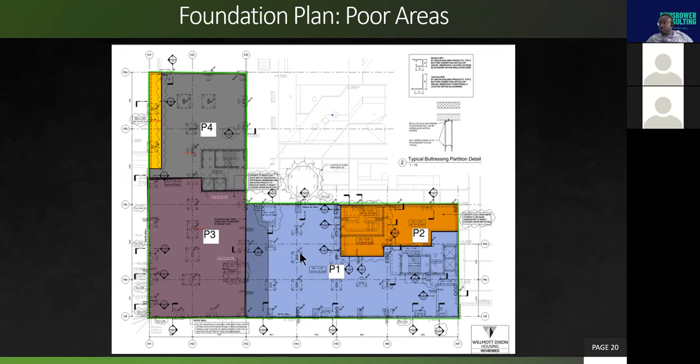So if you zoom into this, you can see these dots. Those are the piles. See all these round dots there? Those are the piles that need to be installed. So you can actually use this drawing to count how many piles are required to be installed on this particular project. You see this round bit here, that is where the crane base is. So you can see there's 1, 2, 3, 4, 5, 6, 7, 8 piles to be installed for that crane base. Okay, so that's just something you need to note.